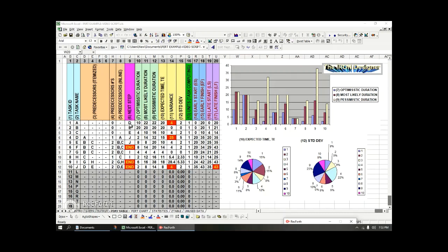The next step is to look backwards, okay? So now we're looking back. If you were at D, your prior predecessor is A. So I just took this part of the chart and inverted it. If you're at E, you look back, you needed B to get going, okay?